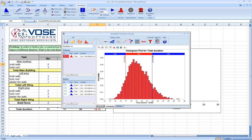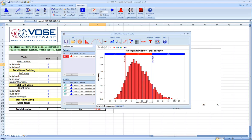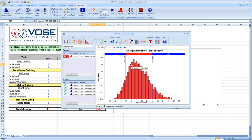We're looking at the result, remembering the result, and repeating it over and over. Essentially, we've done 5,000 what-if examples of this particular project. The results window has come up when the simulation is over, and what we see here first is something called a histogram.